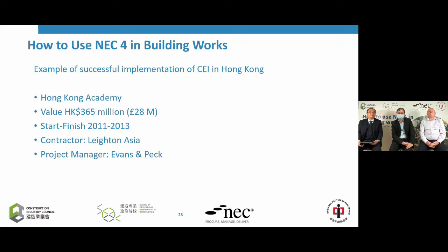Now, in fact, in Hong Kong, we do have successful implementation of projects using the ECI process. And this is one that I managed to get from the NEC4 website. We are talking about the Hong Kong Academy, with a project value of something like 365 million Hong Kong dollars or 28 million British pounds. The start date is 2011 and the finish date is 2013. So we are talking about just 2 years, for a very huge project, the Hong Kong Academy. And the contractor is Lighting Asia, and the project manager is Evans and Peck.